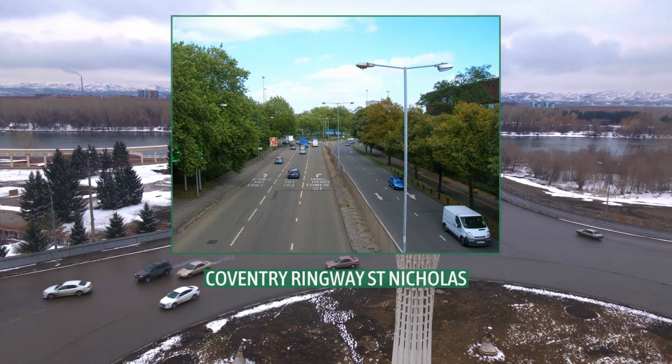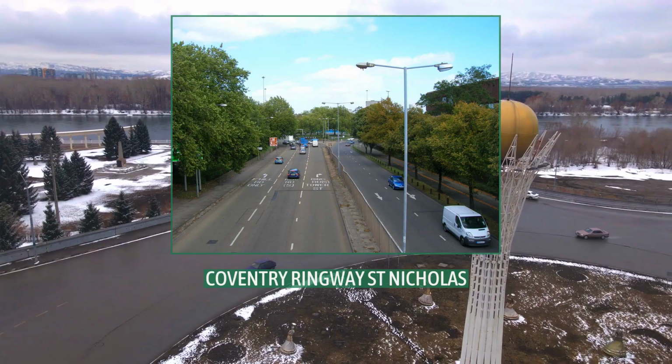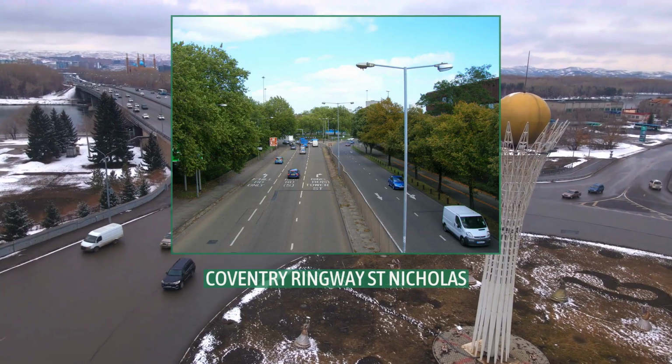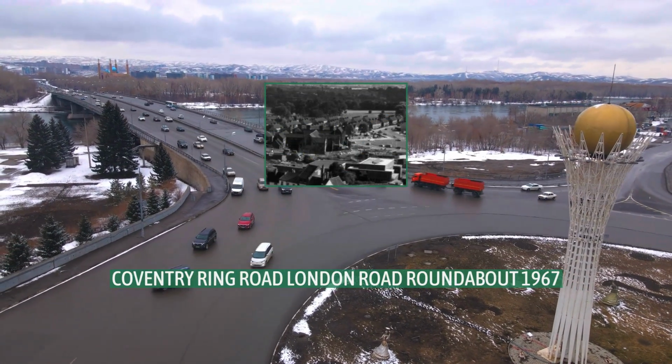Interviewers were stationed close to the planned line of the Ring Road, where they asked drivers their origin and destination. The results of the survey were published in late 1960, predicting a 150% increase in light traffic and a 75% increase in heavy traffic during the subsequent 20 years.